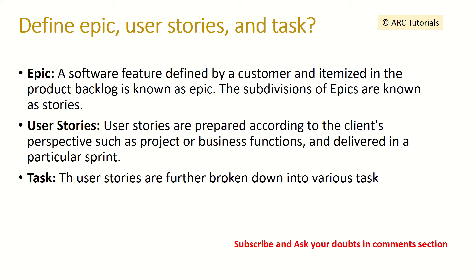Can you tell me the difference between an agile epic, user stories, and tasks? An epic is a software feature defined by a customer and itemized in the product backlog — it is the top-level itemized feature. User stories are the breakdown of features into smaller, achievable tasks. A task is the lowest level — for example, a user story called 'login' can be broken down into tasks like 'user validation.' Multiple tasks make up one user story, and multiple user stories make up an epic.